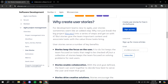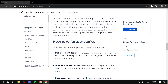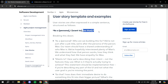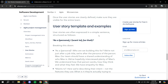They also include examples which really clarify what user stories are. Scrolling down, the structure is usually: 'As a [role], I want [thing they are requesting], so that [the value they will get].' For example: 'As a channel owner, I want to make sure our videos are 1080p so that we ensure high quality.' That's user stories in a nutshell — and why you would want to use them.